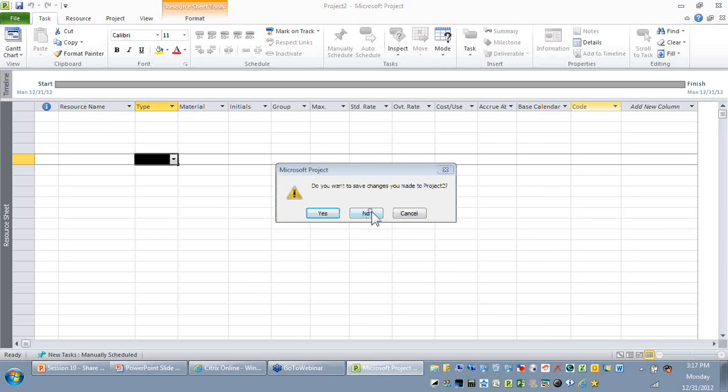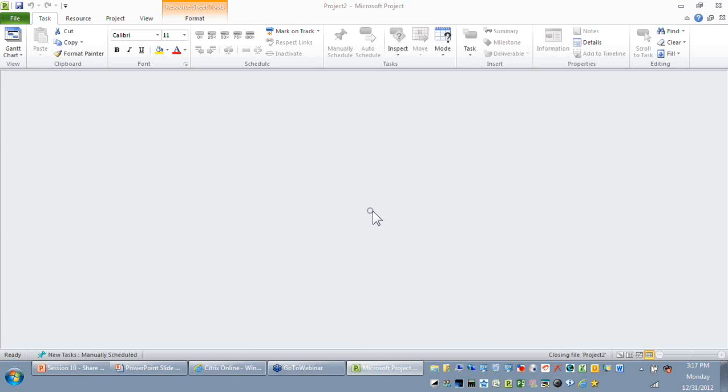So what we are trying to do here is, when you have a resource pool file, this information is getting shared across multiple projects. Ideally speaking, each project will be managed by different project managers. So the point you need to remember is these three files should ideally be stored in one common location that is accessible by all the project managers. There might be different scenarios in terms of how to open these files.